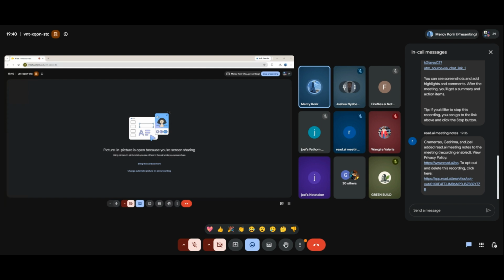There are usually four types of schedule logic: start to finish, finish to start, finish to finish. Finish to start basically means a succeeding activity cannot begin until a preceding activity has completed. One has to finish a task so that they can start another one. You cannot do a reinforced concrete frame if you have not completed the substructure works. So that's finish to start.